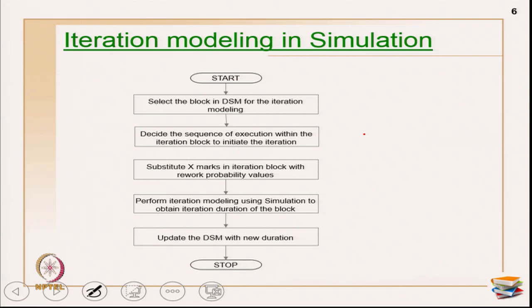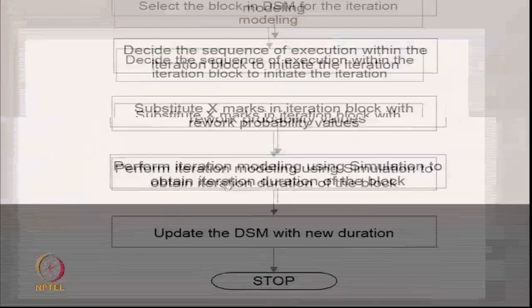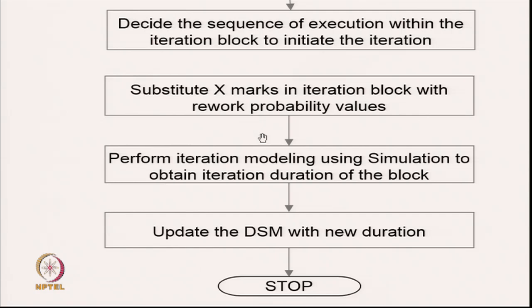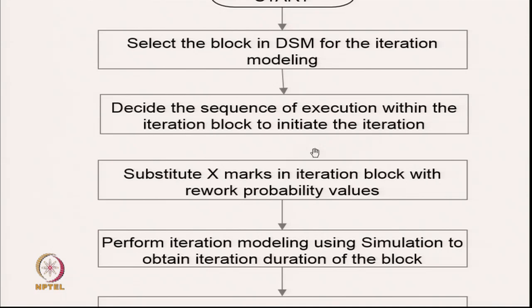Coming back to phase 4, operation number 4 - iteration modeling in simulation. Simple steps are given here for the simulation exercise. The first step is to select the block in the DSM for iteration modeling. You have to select the block in the DSM for iteration modeling. In the last example, I have only one block, so you can choose that and decide the sequence of execution within the iteration block to initiate the iteration.